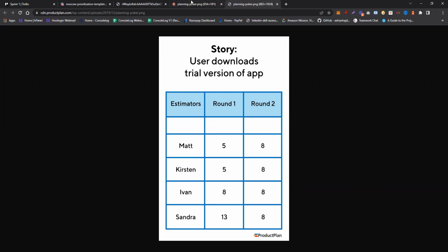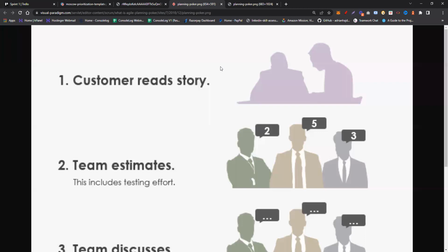This is very easy. First, you have to tell the story from your user story, being a Scrum Master, so that your team can understand that user story very clearly. Then ask them to give you a point based on the effort and complexity. The points will be 2, 3, 5, 8, 13, 21. 2 means easy, 21 means the effort is huge. If the effort is going beyond 7 days, that means you have to split that user story. An individual user story should close within 7 days.